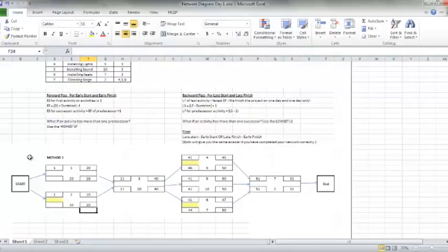And now, thank goodness, we're on the very last two where we're working backwards, and we're figuring out our late starts. And so we take that late finish, subtract out the duration, and add in 1. So 20 minus 20 is 0, plus 1 is 1. And 20 minus 10 is 10, plus 1 is 11. You see the picture that's being painted here?